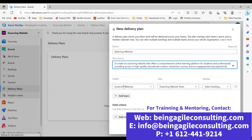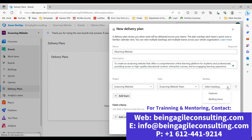Select the projects you're creating the delivery plan for. In this case, it's already populated because I started by selecting the project. The team working on this plan is the e-learning website team. For the backlog, I want to generate at feature level — not at the product backlog work item level, which is more of a user stories level. So I'm clicking the drop-down and selecting Features.